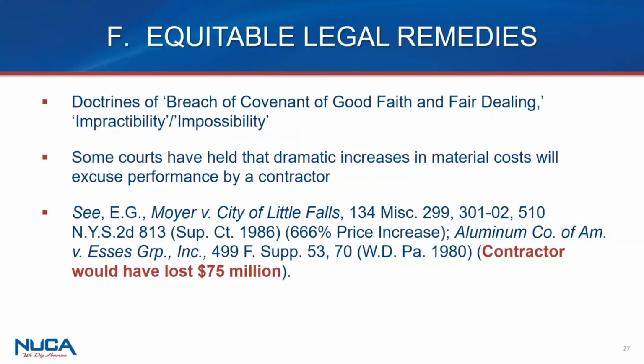Okay. I want to say one thing before we turn to equitable legal remedies. We've been talking about remedies that are contractually based. Three things. One, if and to the extent the owner delays the work into a period of time where it's more costly, the owner, under most contracts, absent a no damage for delay clause, should be responsible to pay for the increased material costs associated with the work being delayed to a later point in time. Some specs especially provide for that.